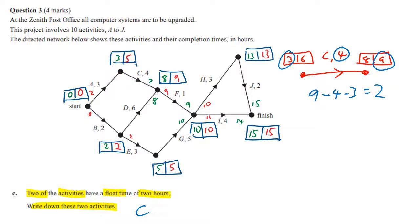The other one is actually A, because you can see they're on the same path so they've got to have the same float. There's no other paths involved here and we can see a little two here, but let's just take these numbers and see if that actually does prove we've got a float of two.